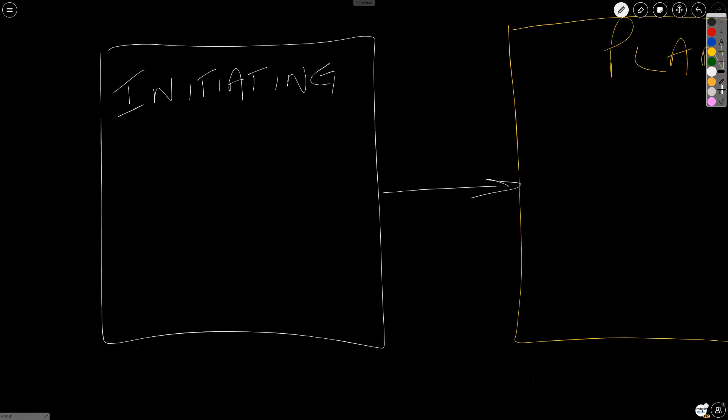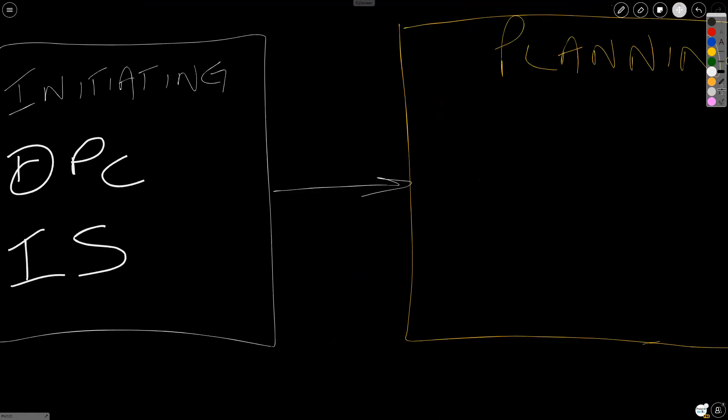In initiating, we have the develop project charter process, where we create the project charter, and we have identify stakeholders, where we create a stakeholder register.